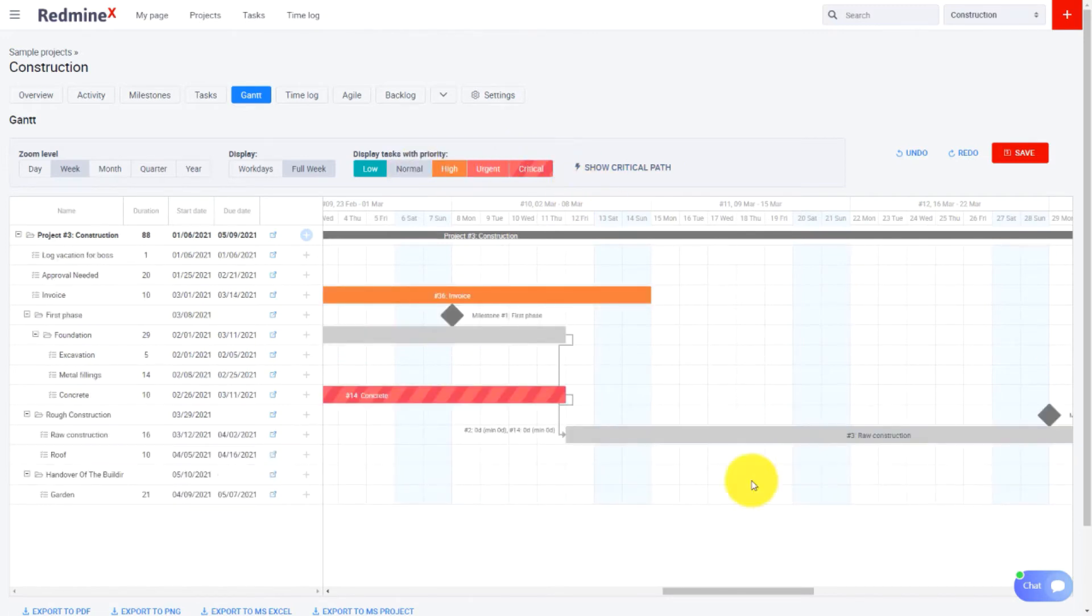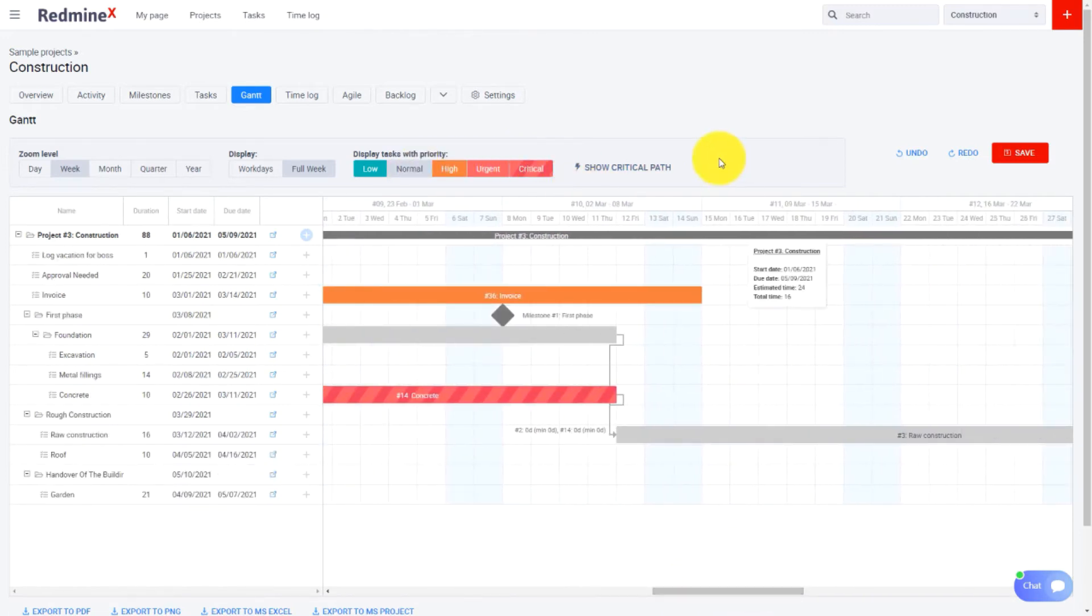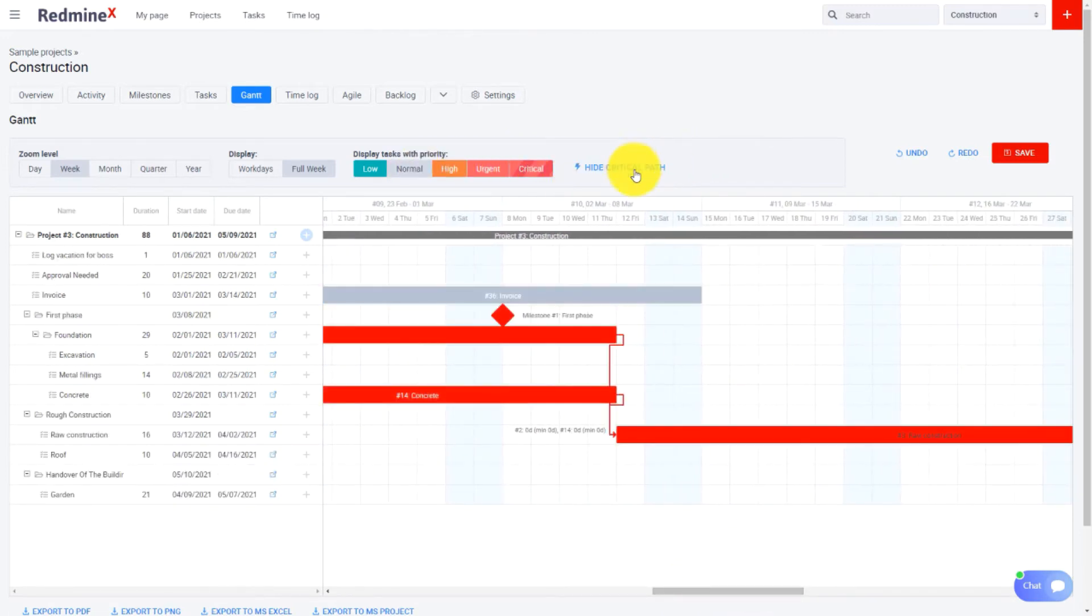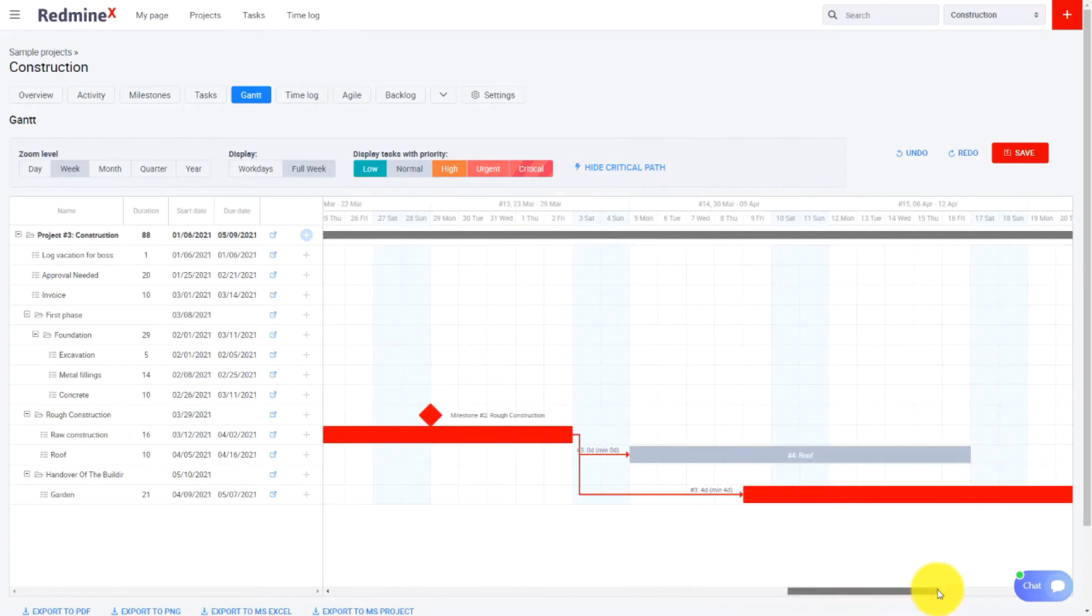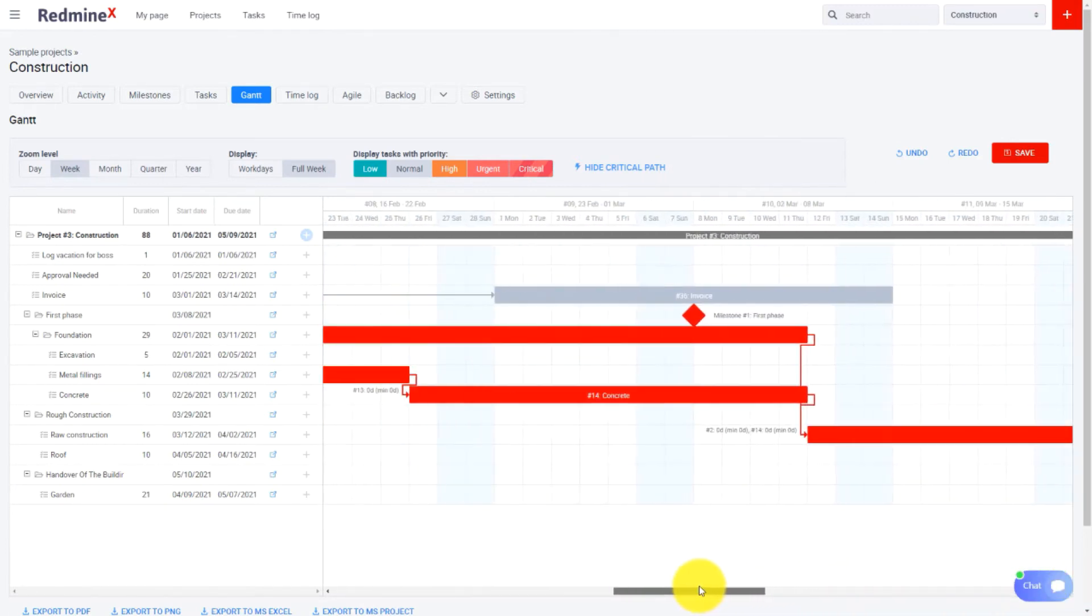In the project level Gantt chart there is an additional feature, Show Critical Path, which simply displays the critical path of your project.